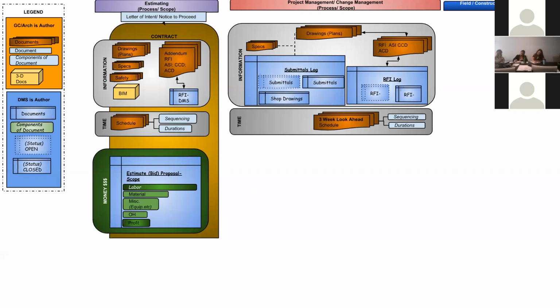So they'll ask us to come out and do layout, do shaft work, any kind of exterior work, then going into interior work. Once we build the walls, all the electricians and everything have to put everything inside of it. And then about 6 to 8 weeks later, they'll want us to do the ceilings.